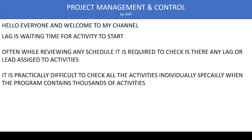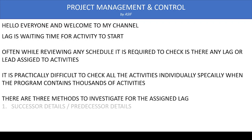We will now see how to determine which activities are assigned with lag or lead time. There are three methods. The first method is to show the successor details and predecessor details columns in our layout, then go through all activities to see which are assigned with lag.